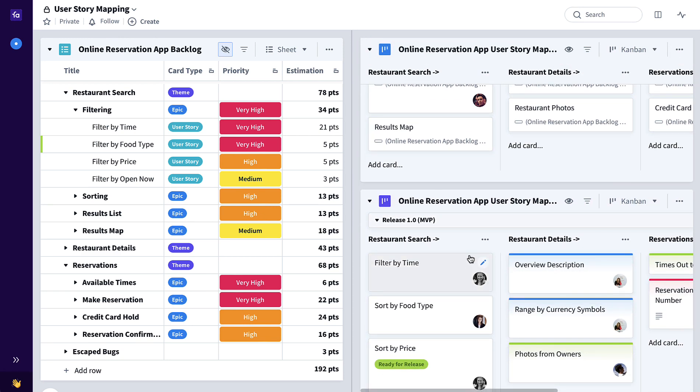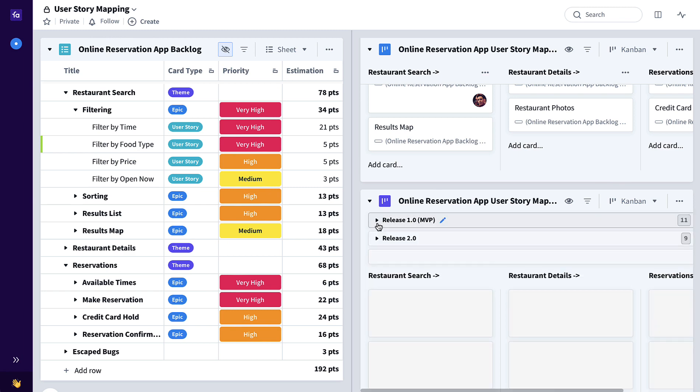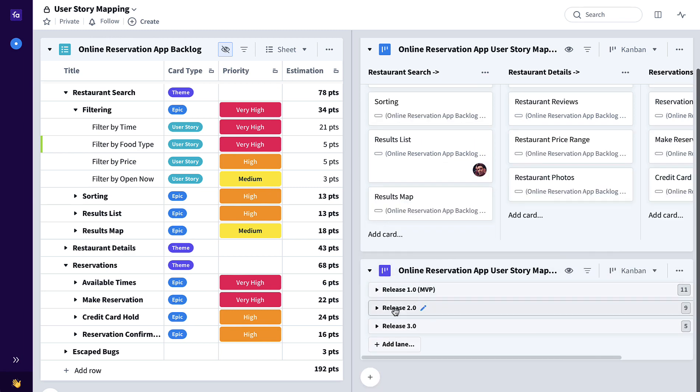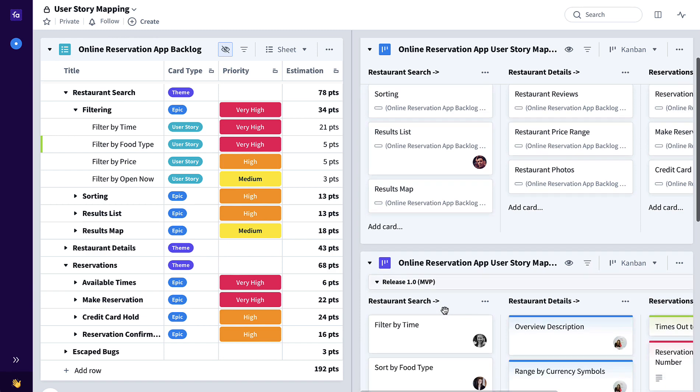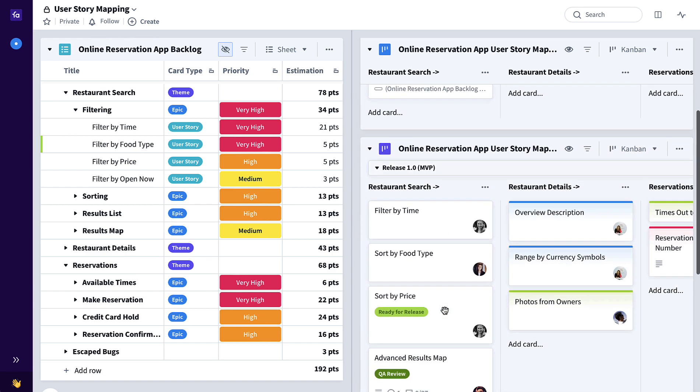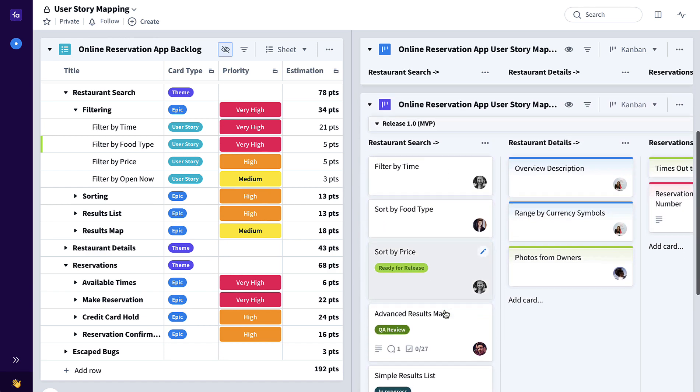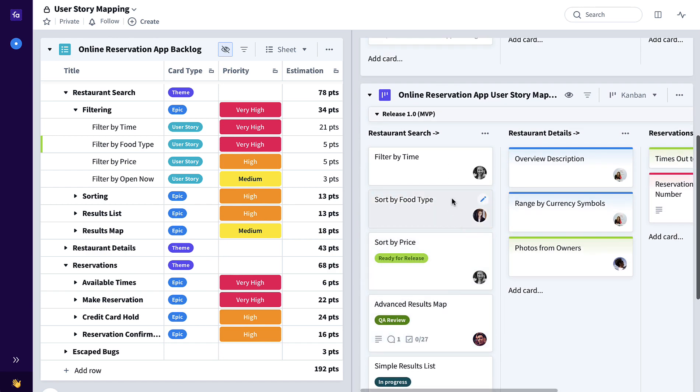Here we have a swim lane representing release one MVP, release two, release three. If we expand this, you can see we're now adding user stories to this user story map so we can get more specific, more detailed as to actually what we're going to deliver in, for example, release one our minimum viable product.